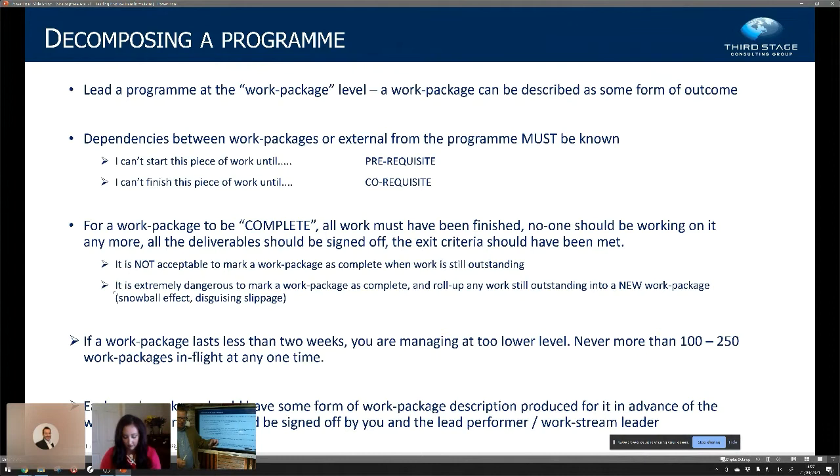And of course, then that work package overran. So then he closed that one and he ran the overrun into the next work package. And by the time that this all came to light, the project was millions over budget. Well, yeah, about 3 or 4 million over budget. And he got fired for it, actually, which was a bit shocking.